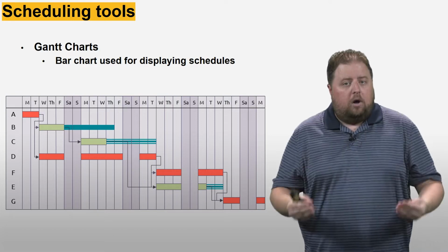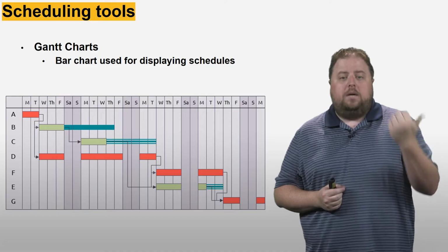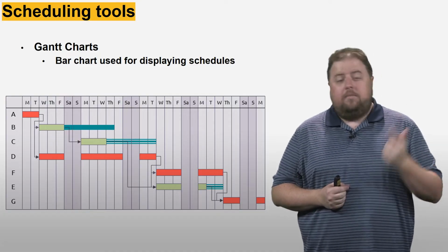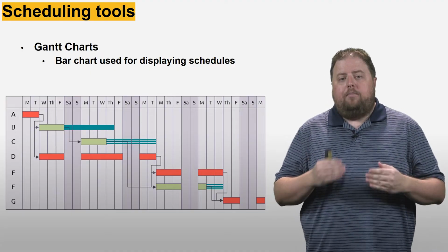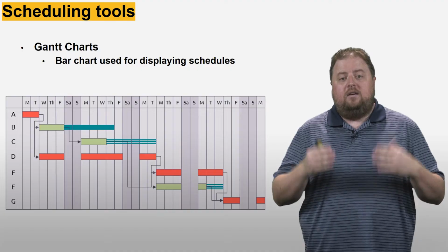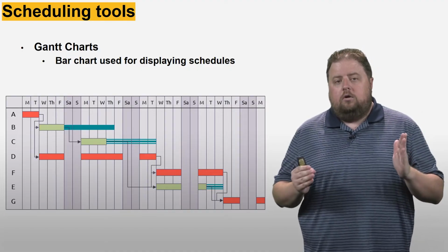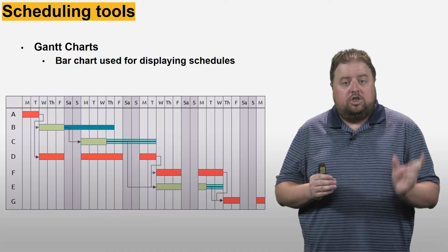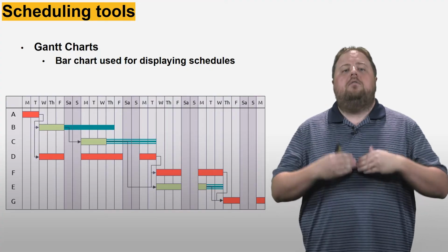In more advanced Gantt charts, we essentially change colors to signify what has been done, what hasn't been done, maybe what is late. And in the example on the slide, the red bars represent the critical path. This is the path of tasks that will make and define my project length. You'll notice that if any of these critical activities are shifted to the right, then the entire project is shifted to the right because of the precedence.